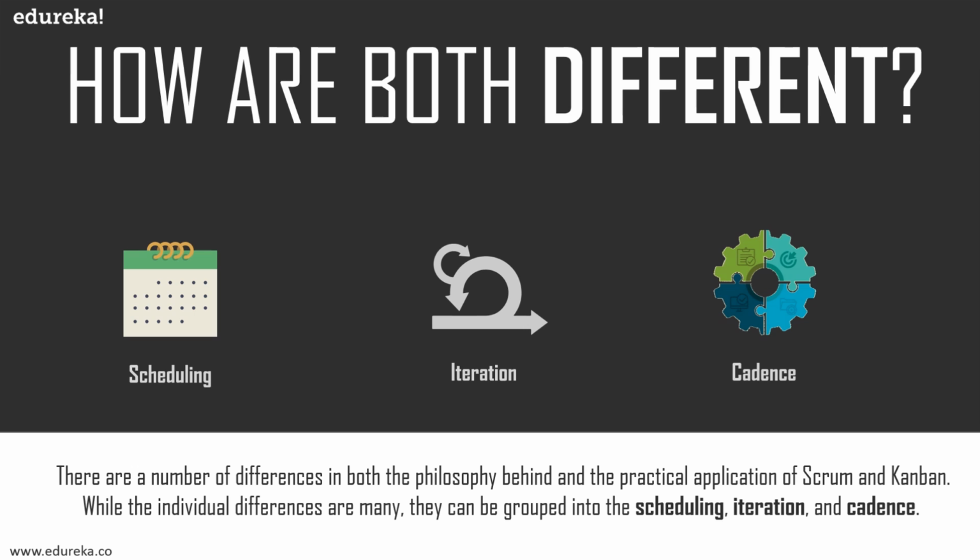On a Kanban team, there are no such required time boxes or iterations. While the Kanban method is iterative in nature, the continual improvement is expected to occur in an evolutionary fashion as work is continually completed. The limitations based on various conditions in the workflow will be regulated early in a team's or an organization's use of Kanban until an optimal set of limits is arrived at to keep the flow steady and efficient.